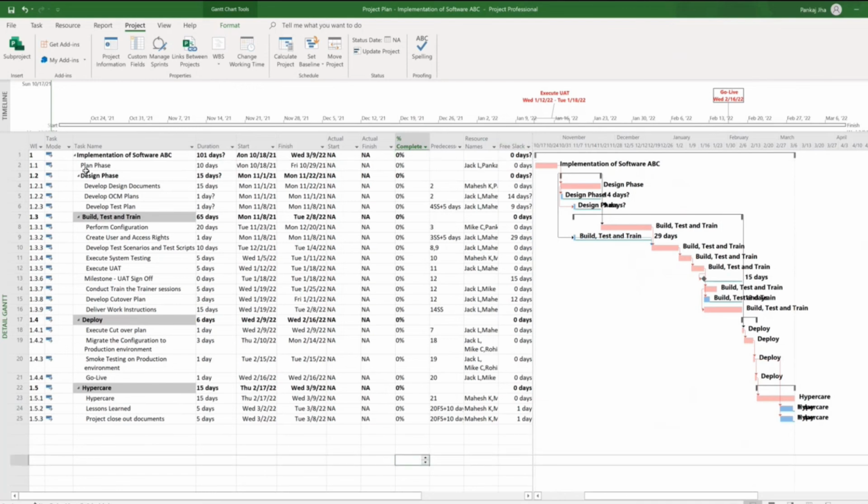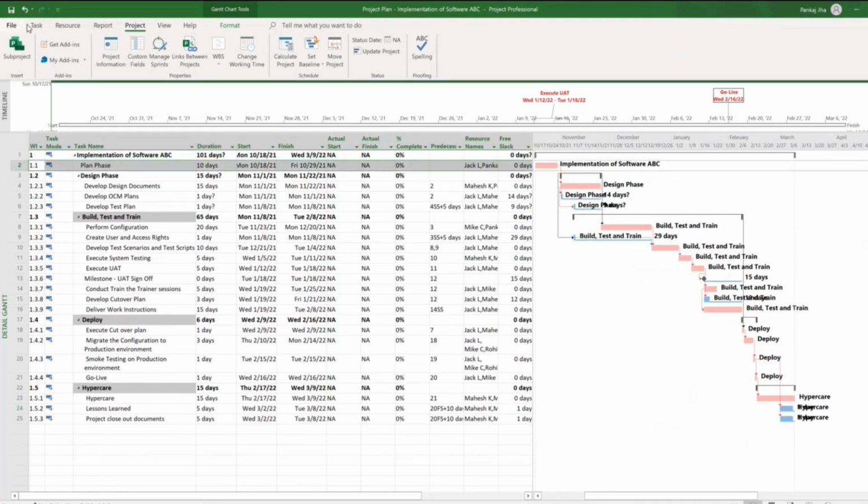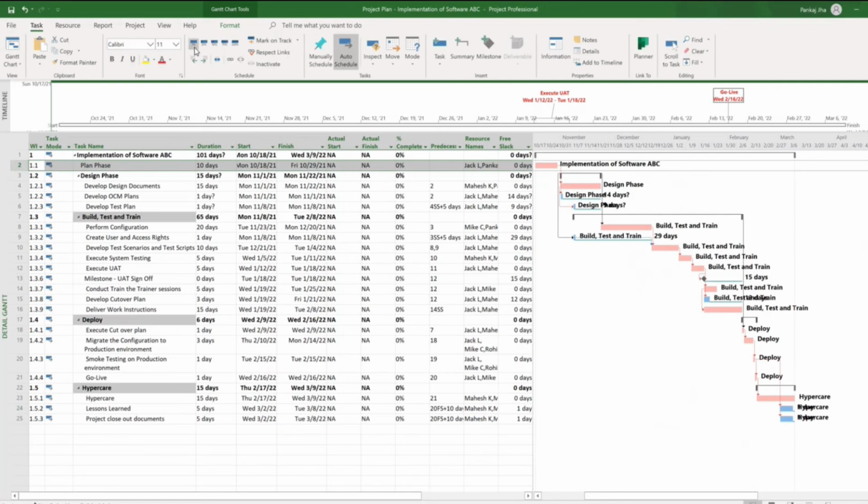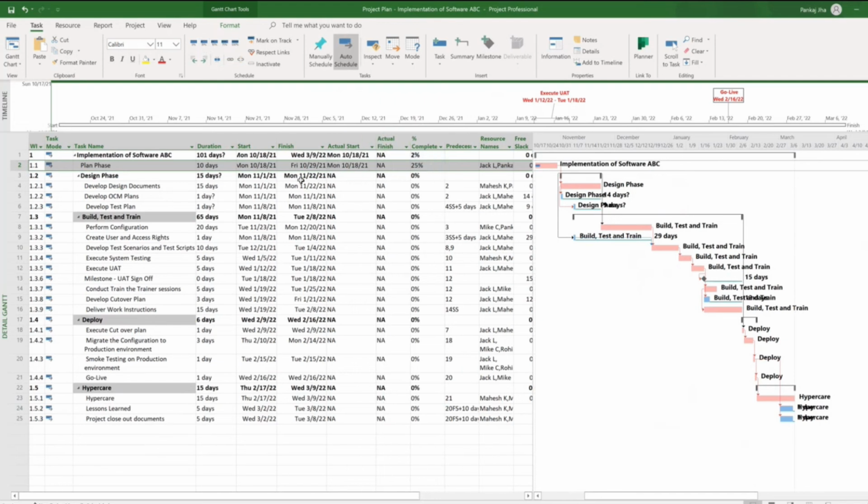Okay. So based on the project progress, we can indicate whether it is 0, 25, 50, 75, 100, that we can mark. Like if you know that okay, this task is 75% completed, 25%, just click on 25. Okay, and you can see the project progress. If it is 100%, you can mark it as 100%, and you can see the project progress with this bar, the blue bar inside this.